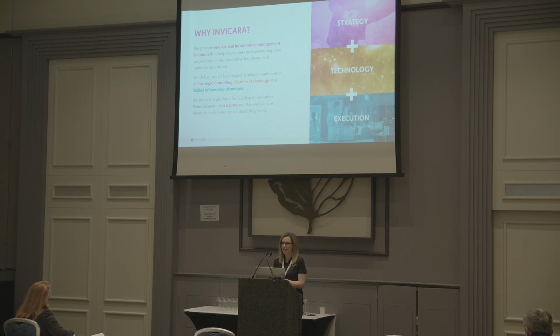And then creating a platform for building information management. It's not all about the models. We're talking about managing this information because there is so much of it. If we were to ask design teams and contractors to classify and hand over data on thousands upon thousands of elements, as there is in your models, it's a very daunting task. So we're not asking for that. We work with the client to deliver a very specific list, refined for what it is that we want to capture, collect, and track.